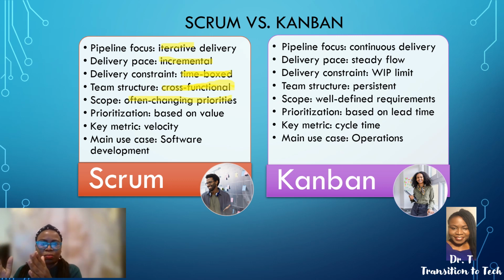It moves to in progress, then to testing, and then to demo, where the product owner and other stakeholders come in and take a look at that functionality, and then it moves to done. So those are the states. That's work in progress, and the WIP is the constraint around delivery. You want to keep only a certain amount of items in each state so that you have that continuous flow and that continuous delivery.